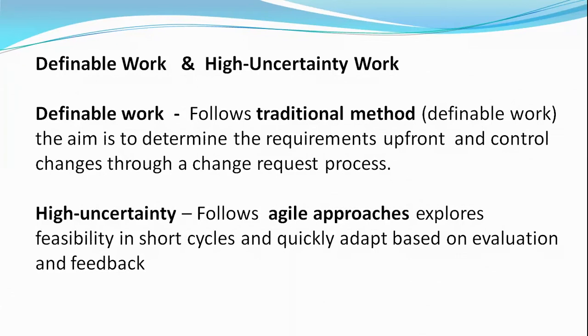And if at all there are any changes, like the color of the paint or maybe where the wardrobe has to be placed, these small changes have to go through the change control process, following the protocol of getting the approval. Then only after the approval are you going to execute it. There are a few more steps in that. So at a high level, you need to get an approval and only then can you implement it.